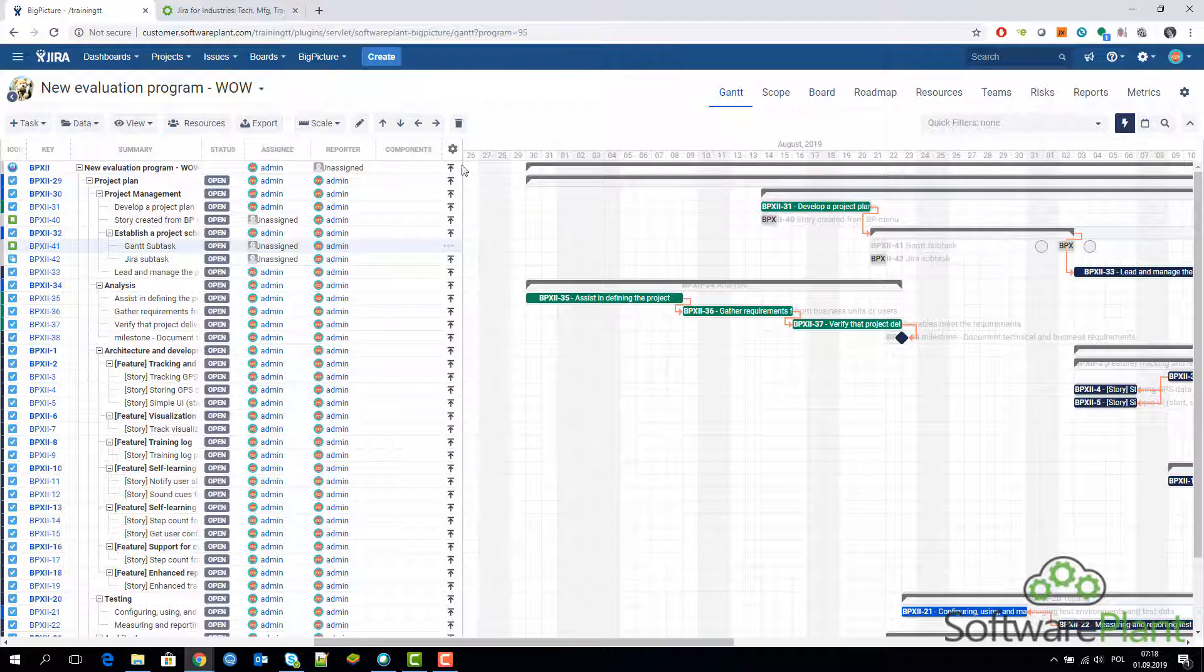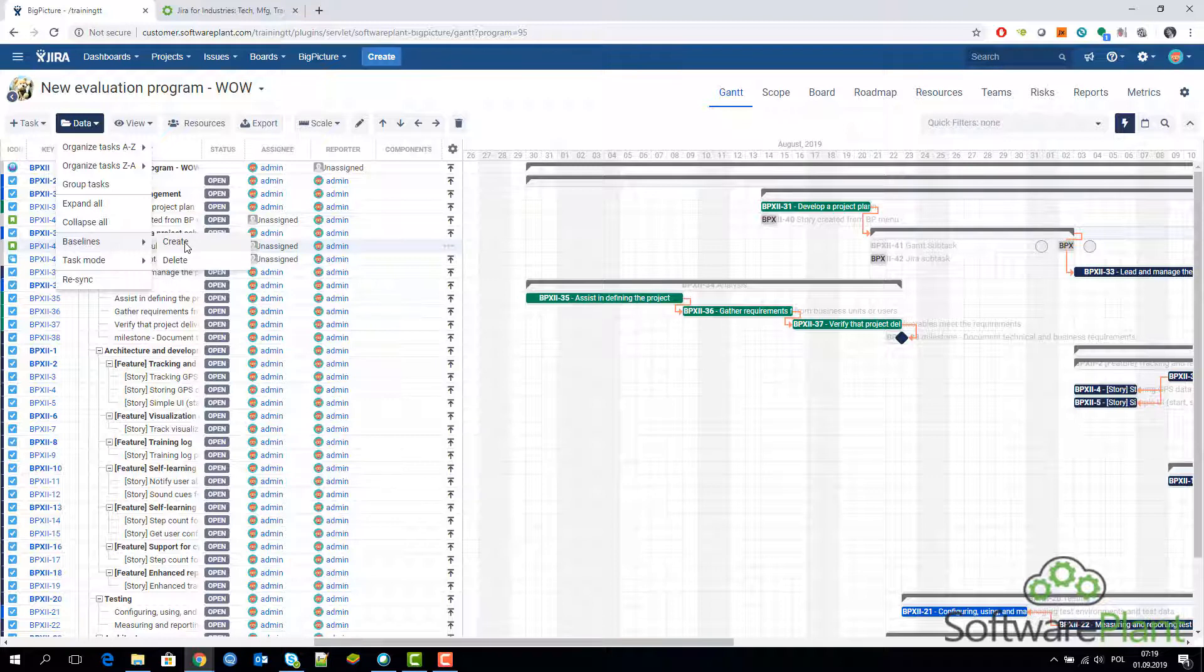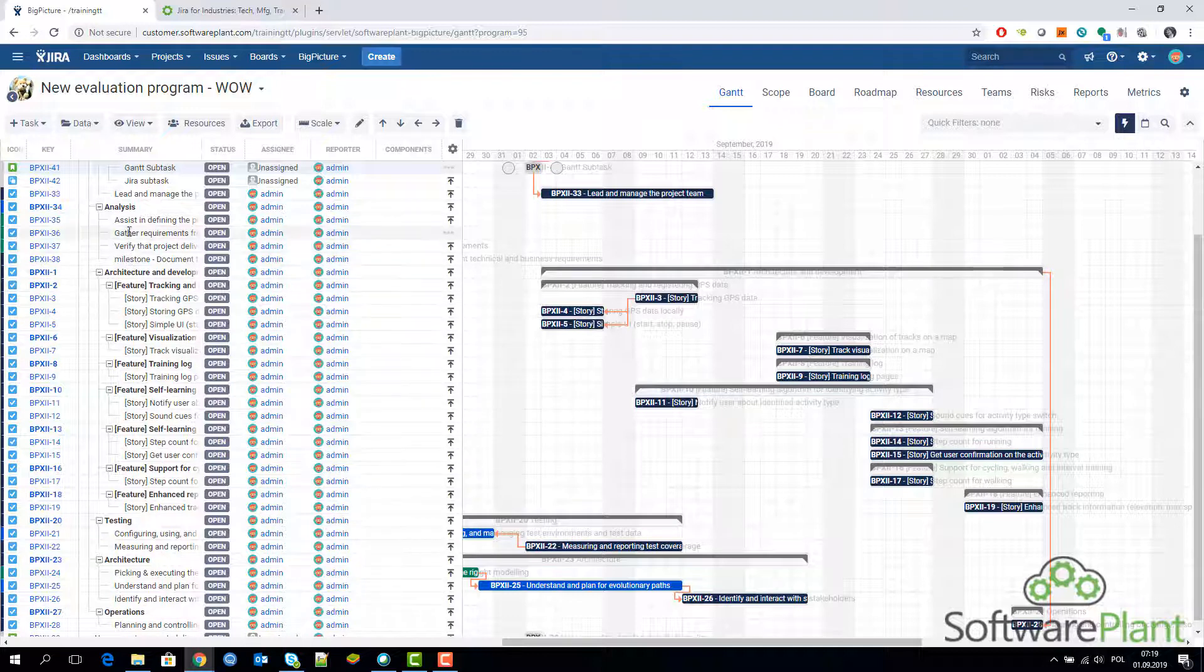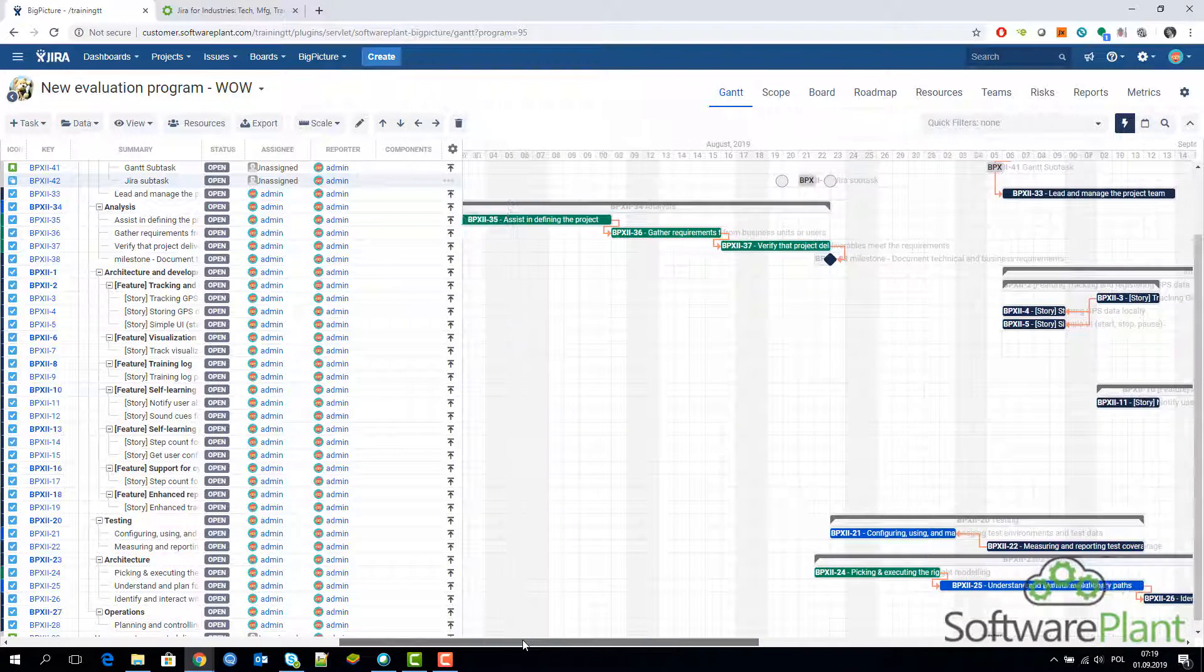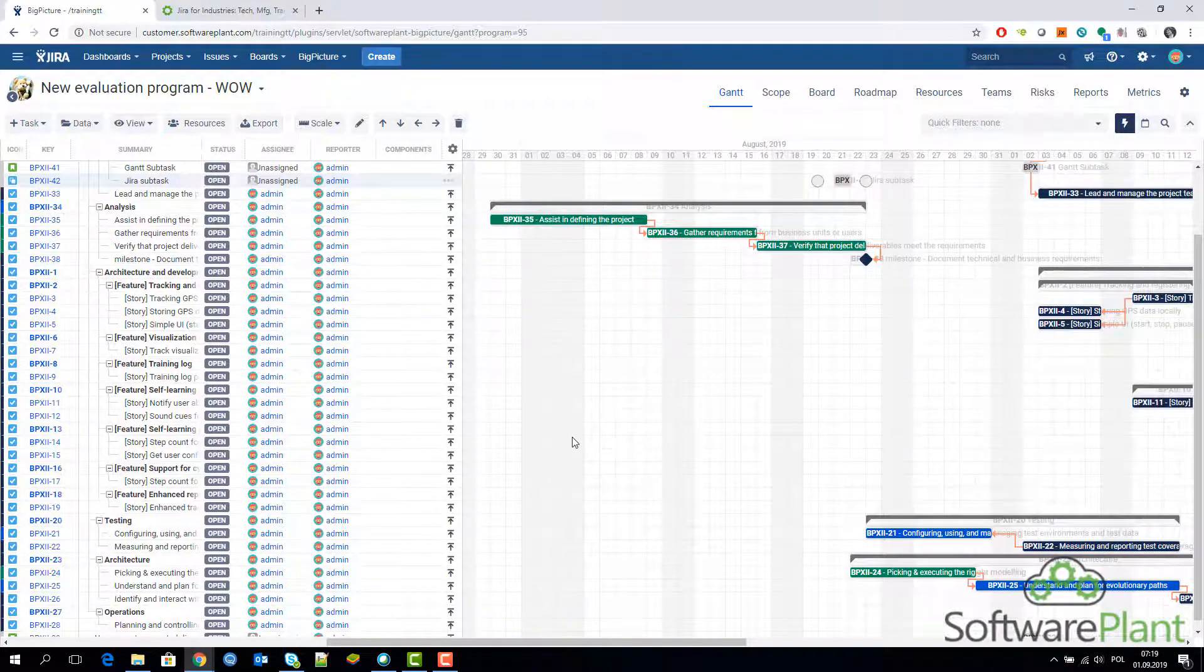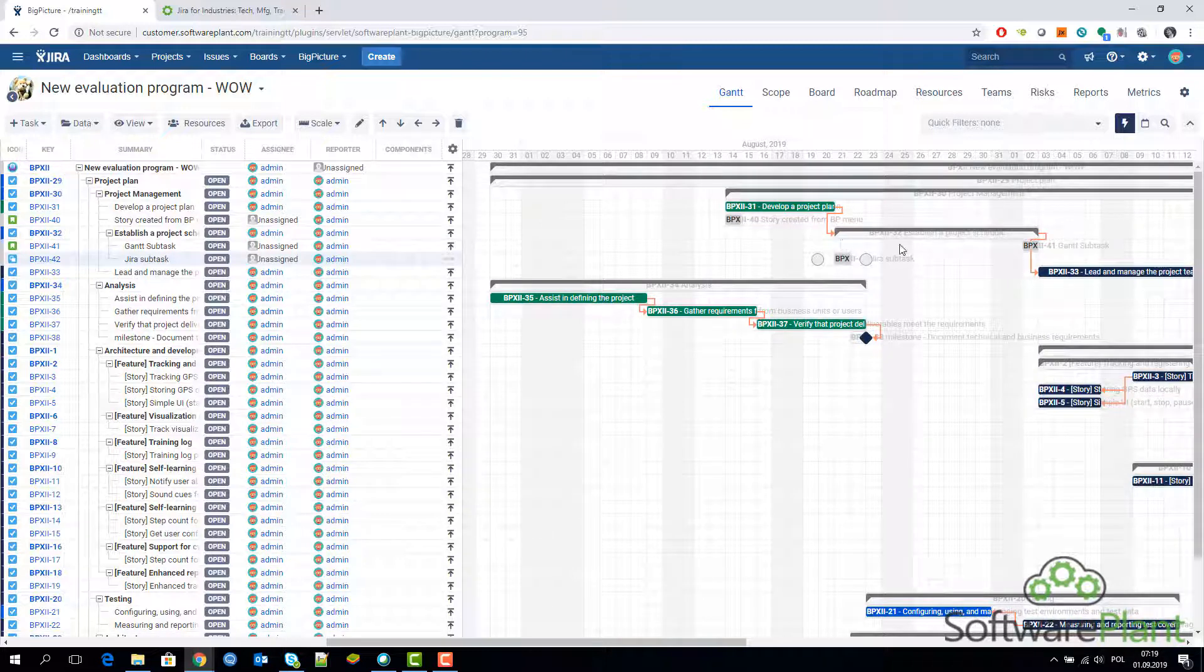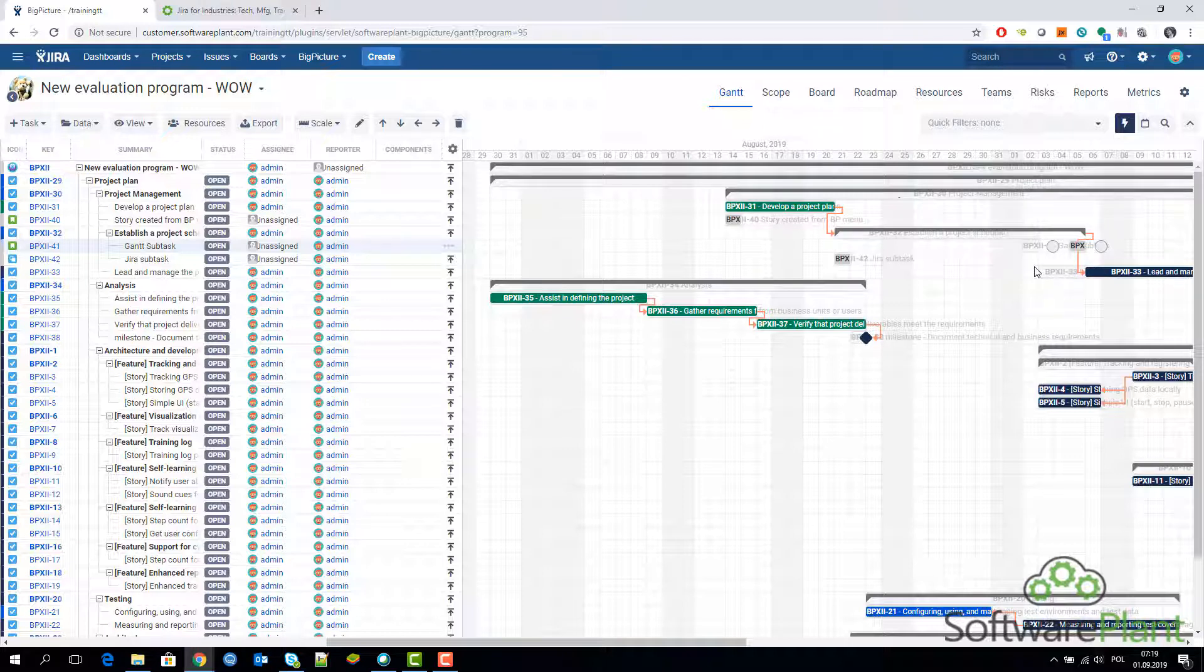This is how the baseline works. It's a very simple concept but at the same time quite useful in some cases. To delete the baseline you just click delete, but if you want to create a new baseline you don't have to delete the old one, you just click create and the new baseline will be created for you. It had a ghost over here, now the ghost is gone because a new baseline has been created and now the ghost has moved to the 2nd of September.